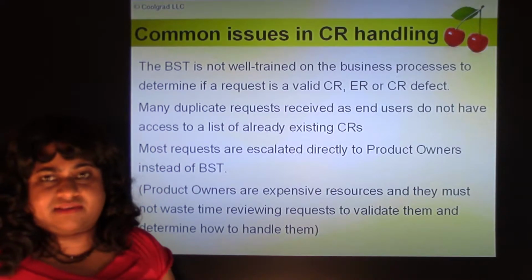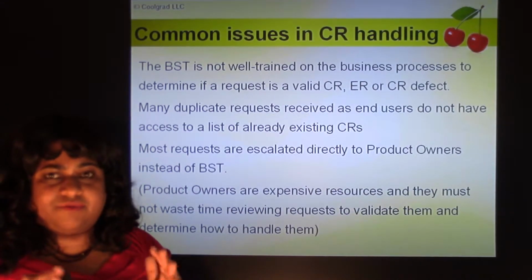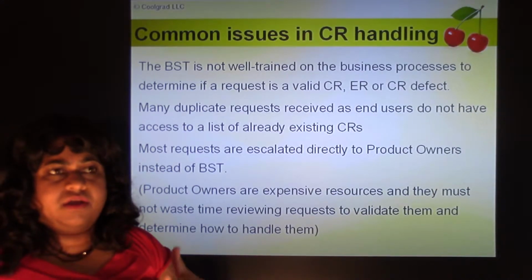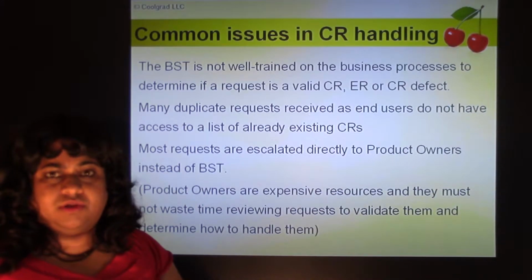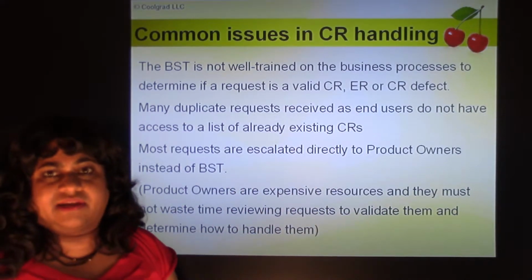There's no proper tracking system. So you must have one particular system using one particular tool, say Rally or Jira or TFS or ServiceNow, any particular tool. And then all the change requests must be submitted only that way. Otherwise, you can't guarantee that it will be handled.